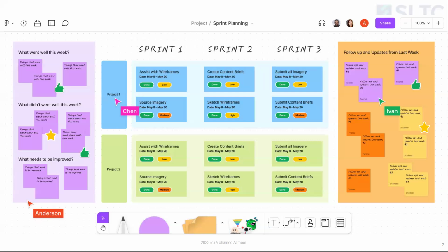We also can say, right, okay, sprint is starting on Monday. And there we go. So Monday morning, we meet again at, let's say, 8 to 8:30. We meet and say, right, so tell me what is going on. So they don't need to explain everything. They'll say, right, everything under control, but I had a problem with my database connection, but I fixed it this way, that way. It's a very short meeting where if someone wants help, they will be given it there. So generally, it's a 15-minute to 30-minute maximum meeting. So once sprint 1 is over, we have a goal. We have achieved a goal, right?